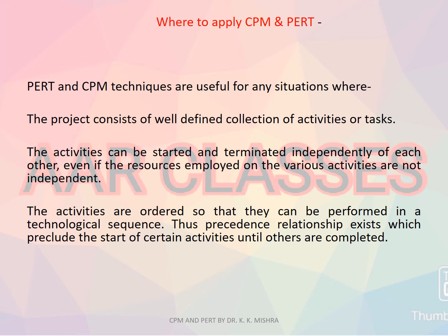Both techniques are useful for any situations where three points are satisfied. First, the project consists of a well-defined collection of activities or tasks. Second, the activities can be started and terminated independently of each other, even if the resources employed on the various activities are not independent. Third, the activities are ordered so that they can be performed in a technological sequence. Thus, a precedence relationship exists which precludes the start of certain activities until others are completed.